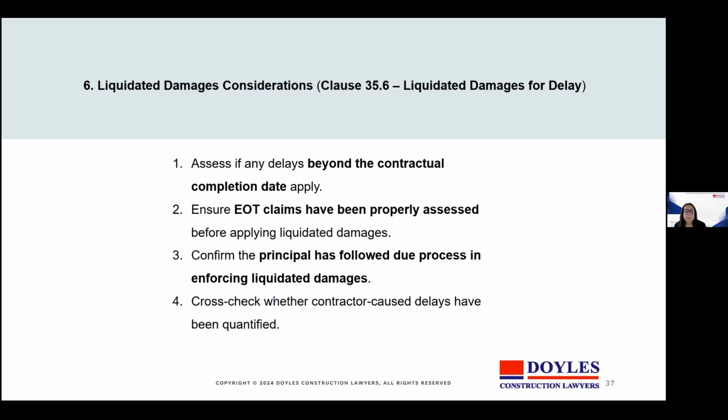So number 6, liquidated damages. It's important to assess if any delays beyond the contractual completion date apply. Ensure that all extension of time claims have been properly assessed before applying liquidated damages. Confirm that the principal has followed due process in enforcing liquidated damages, and cross-check whether contractor-caused delays have been quantified. LDs commonly apply after proper extension of time assessment. So applying LDs prematurely risks breaching the contract.